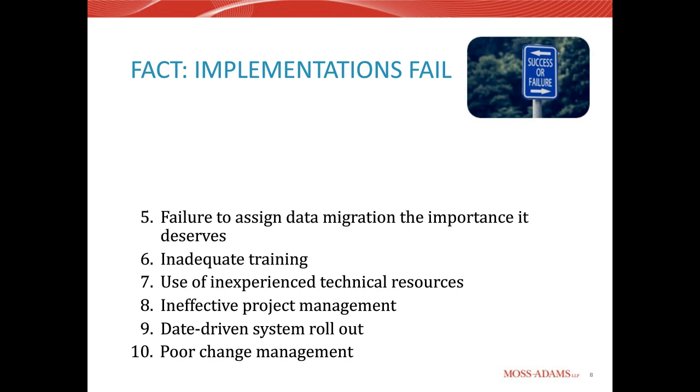Your vendor isn't going to be responsible for data preparation. They give you their template, ask you to complete the templates with your data, and they attempt to load the data for you as provided. If the data fails to load, you're responsible. Therefore, you want to plan carefully to extract data from your legacy system. Cleanse the data so you're not loading junk into the new system, and then obtain guidance from your vendor to map your data to their template.